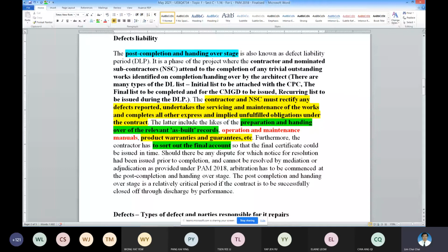But if you think that you have a case, you can bring it outside the contractual time bar and go on to a common law claim. So I always repeat, a contractual claim is easier to process and faster. But if your right is extinguished under the contractual process, you can jump into the common law process. That one will take time and a lot of compilation, and lawyers will be involved.